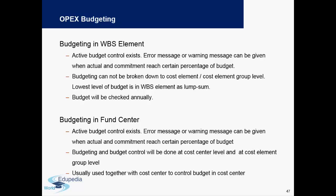The lowest level of budget is in WBS element as a lump sum. In the other case of fund center, the budgeting and budget control will be done at cost center level and at cost element group level. This is the major difference between these two formats.